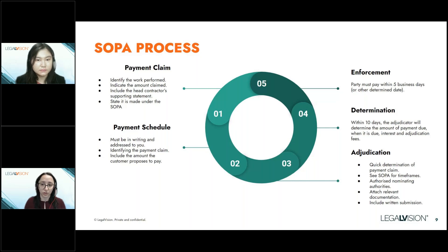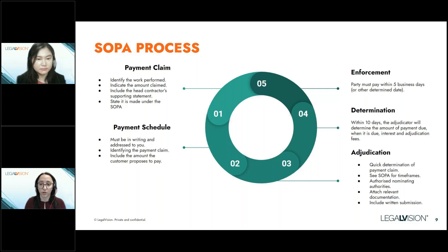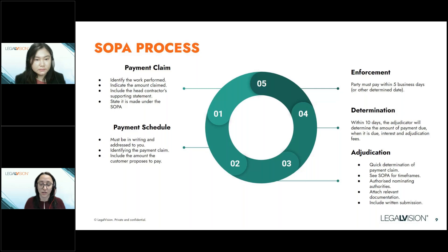Some tips when preparing a payment claim: include as many supporting documents as possible, such as statements detailing the extent of work completed, completion certificates, delivery dockets, photographs, or any other contractual documentation required. Also, especially where it is a large contract with many different parties, make sure that you send it to the right person or entity — check the contract to see who you've contracted with and direct it to that person.